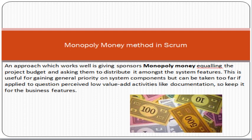Coming to our main topic: the Monopoly Money Method is a method we use to prioritize the product backlog. The product backlog is the scope document which contains all the user stories. A user story is a functional requirement — for example, if you are implementing an e-commerce solution and you want the customer to be able to pay by credit card, that is a user story. Think of the product backlog as an Excel or Word document containing all user stories required for the implementation of a product.